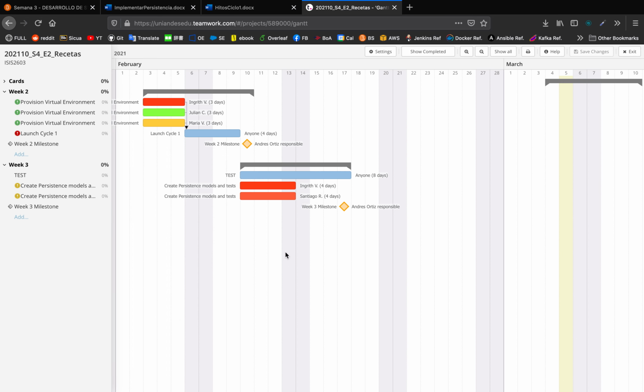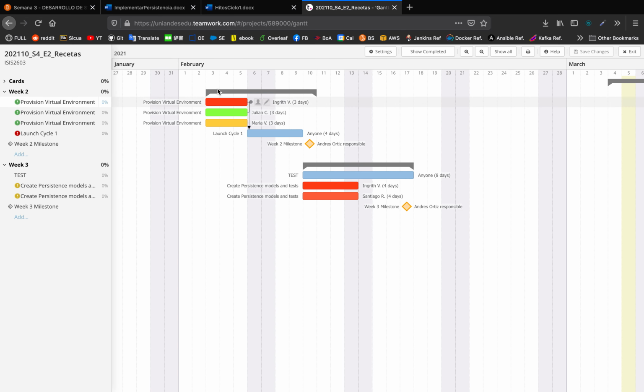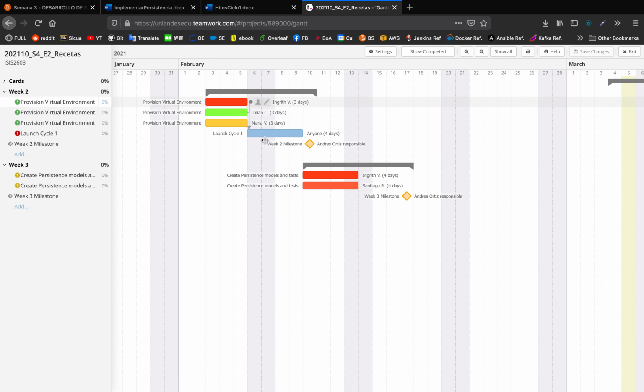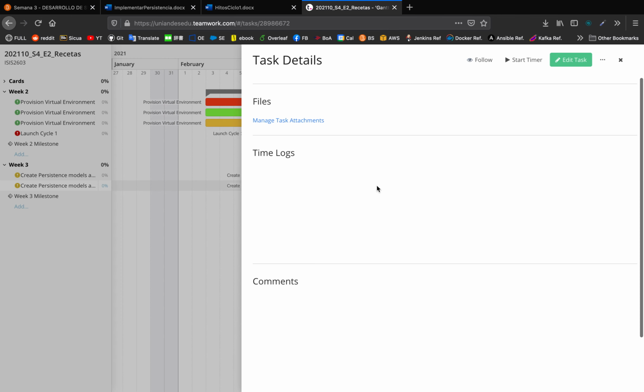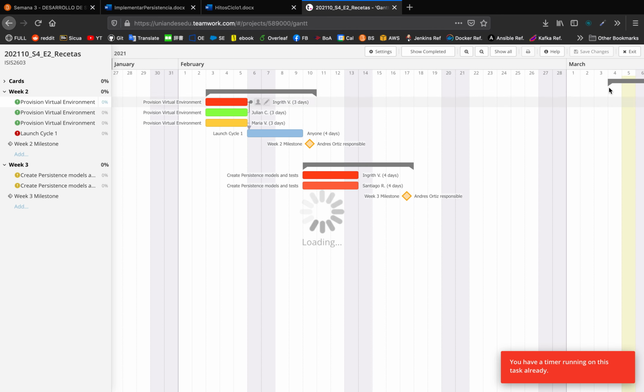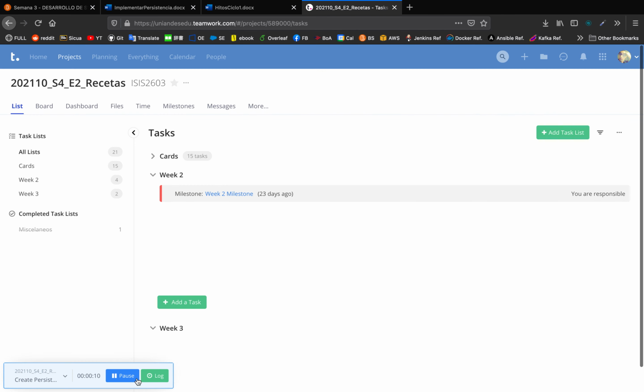Okay, there you go. Now, something very important, guys, is for every single one of these tasks, we can delete this. For every one of these tasks, you're going to have to log how long you took to do this. So the way we do this is, let's say I'm Santiago. I open up this here, and I'm going to put start timer. That's all I have to do. When I start working on this, I hit start timer. Let me hit that here. Oh, I have a timer running on this task already. Okay. So if you take a look here, if I exit this and I start the timer, there you go.